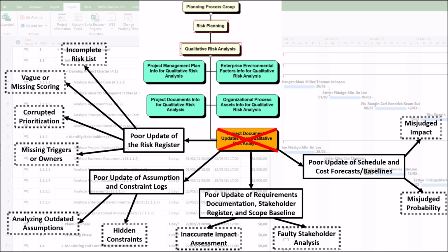Second, misjudged impact. An ongoing cost overrun that isn't logged distorts the assessment of a new financial risk's impact. The baseline for measuring high or low impact is corrupted, leading to inappropriate responses, such as over-engineering a response for a minor variance or under-engineering for a major threat.